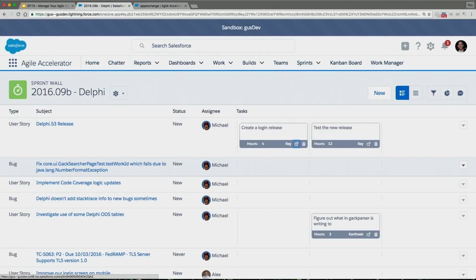And then it does allow you to start to predict who's over-allocated, which kind of developers think like a superstar, think they can get everything done. Or when you story point something, you say, hey, it's about 3 points, and then you put all of the hours in, and you go, hey, well, looks like it's about 75 hours worth of total work, so it's probably more than 3 points. And that's why, while sprints have a little bit more overhead than the Kanban view, they're perhaps a little more structured for the teams that need it, for the teams who are missing their goals.